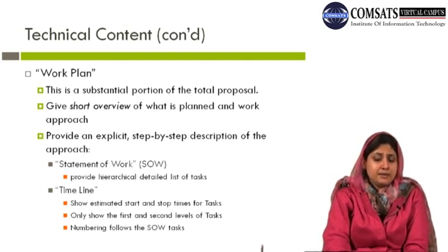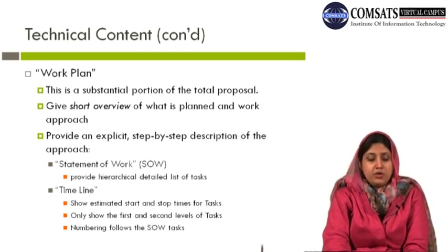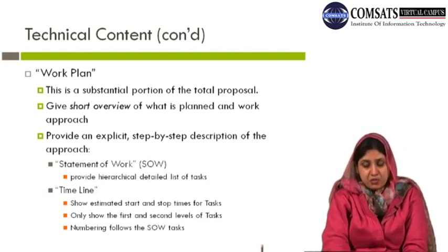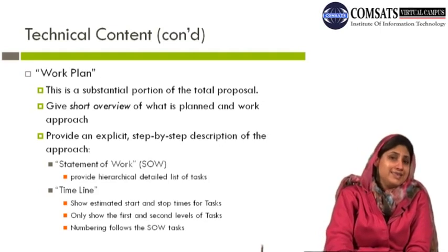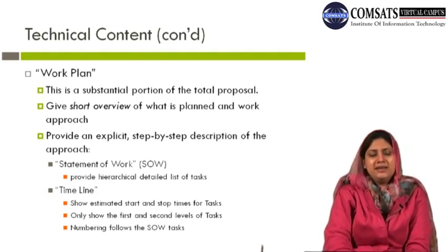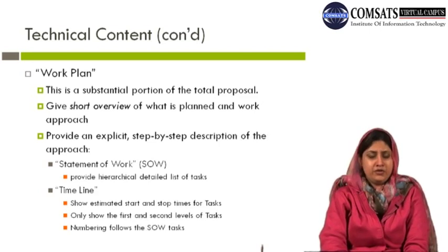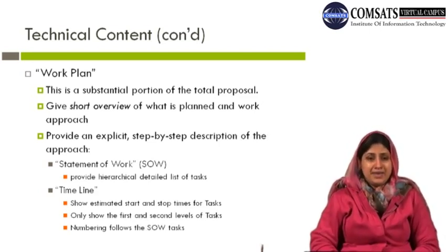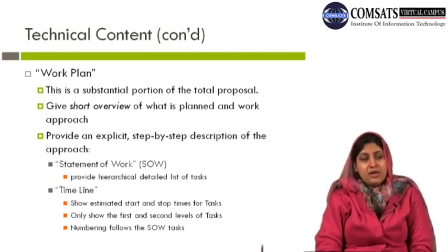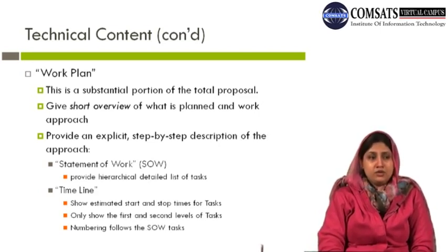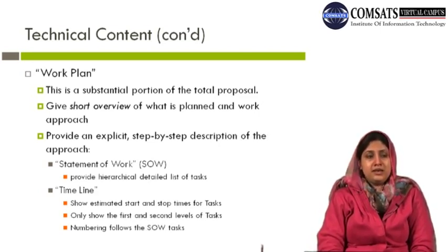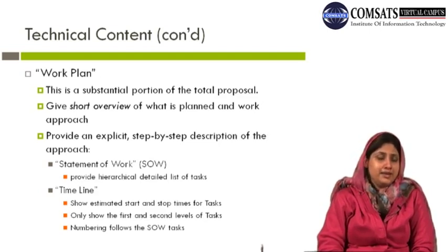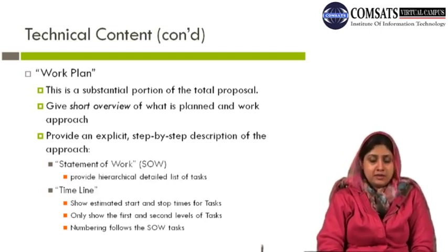And this explicit step-by-step approach describes your statement of work, your SOW, and then provide a hierarchical detailed list of the tasks, the actions that you want to do. It also provides the timeline. The timeline can never be religious. You don't need to tell the dates if you don't want to. However, giving a broad timeline is always good because it enables your reader to understand how long this project will take in its completion.